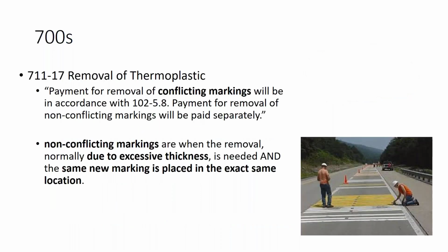We've had many questions regarding the removal of thermoplastic, and the specification currently reads, payment for removal of conflicting markings will be in accordance with 102-5.8. Payment for removal of non-conflicting markings will be paid separately.